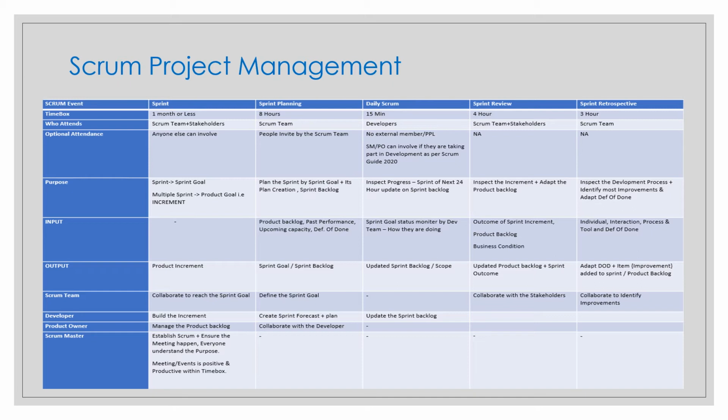So all the items in the sprint backlog come from the product backlog, and so the sprint backlog will be smaller. In that, an epic will be divided into user stories that are contained in the PBIs. And a plan is essentially a decomposition of each product backlog item into smaller work until that allows the developers to build that increment.